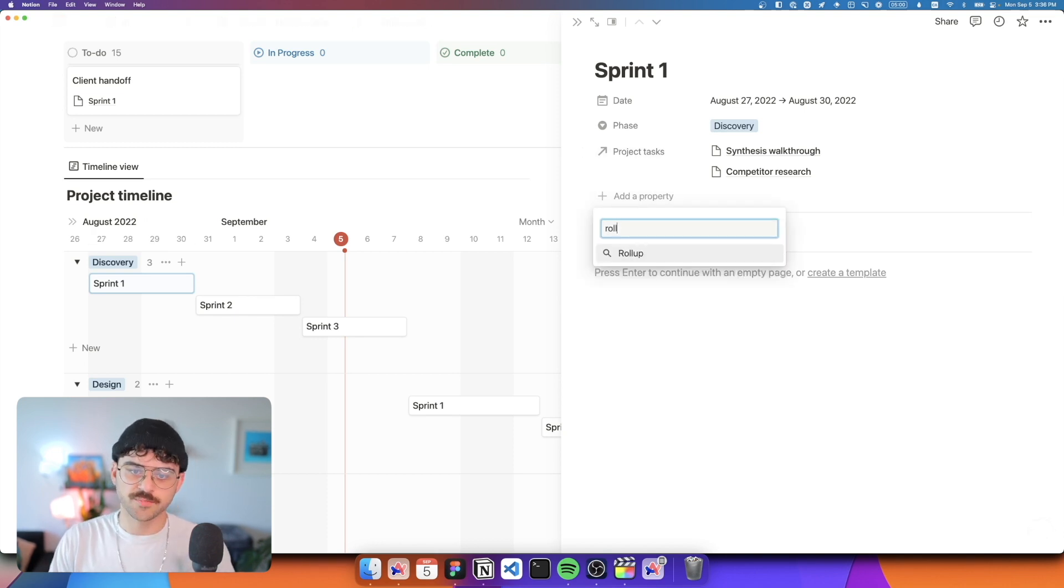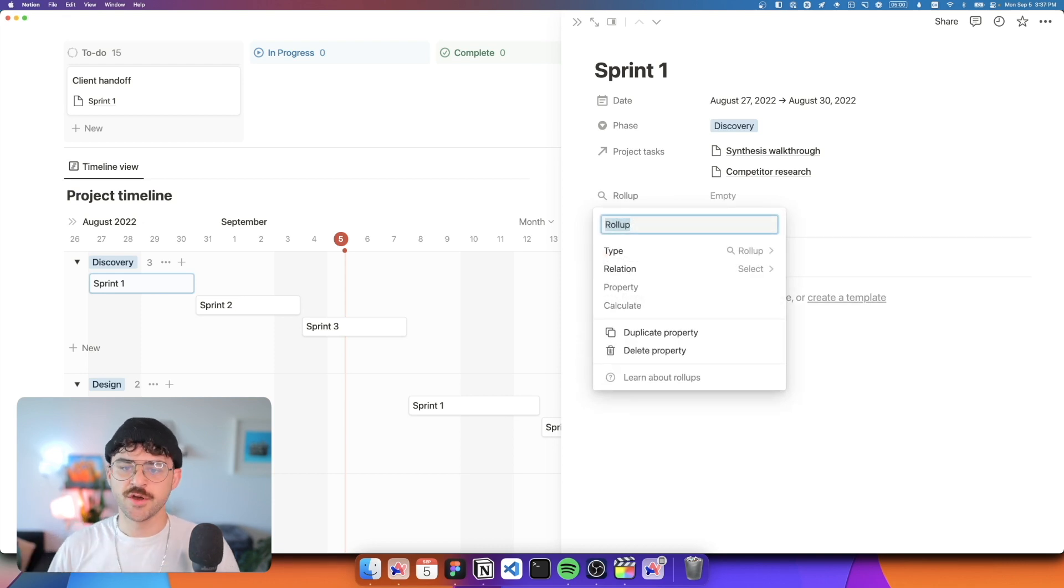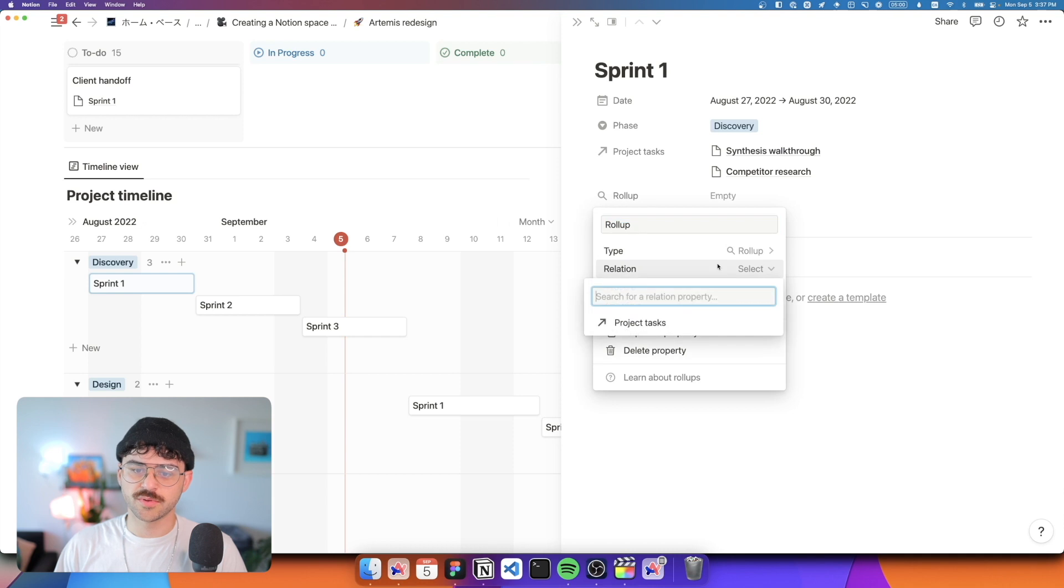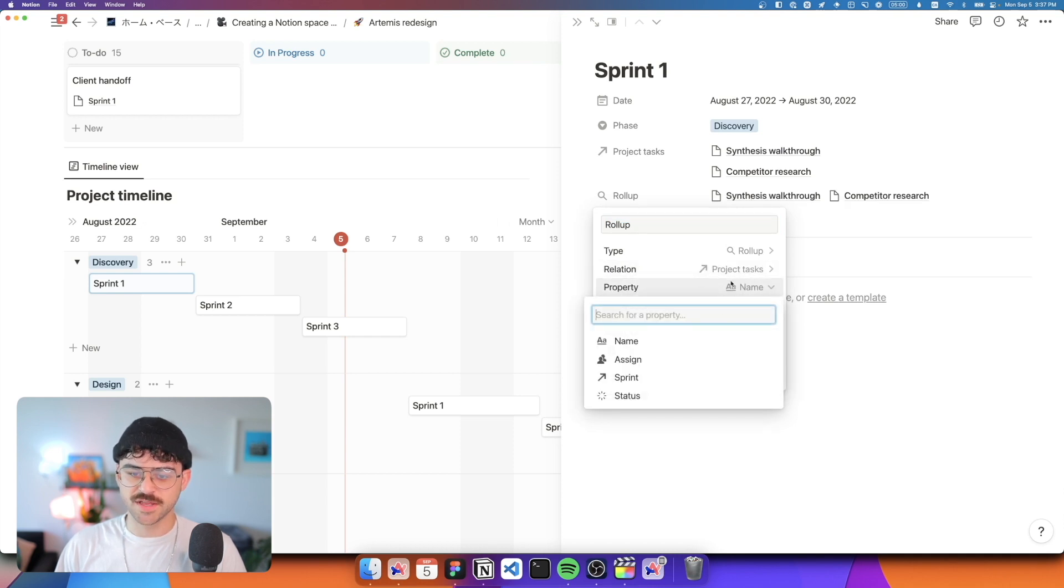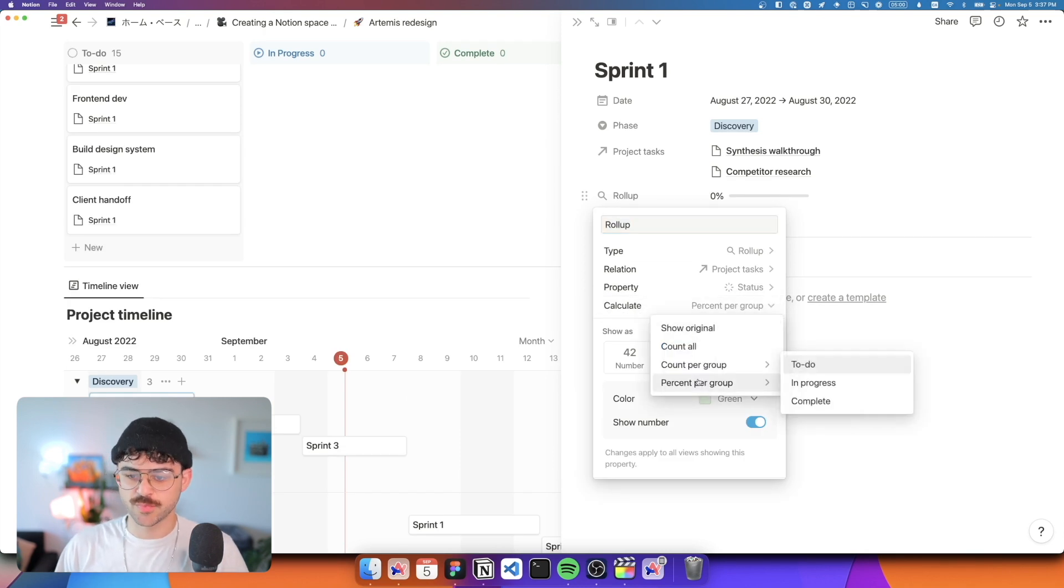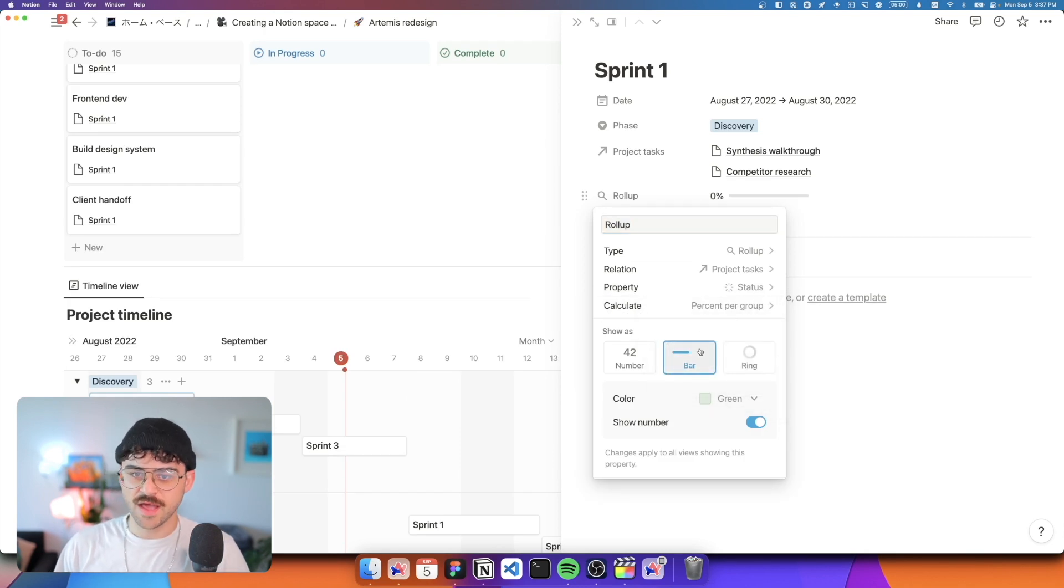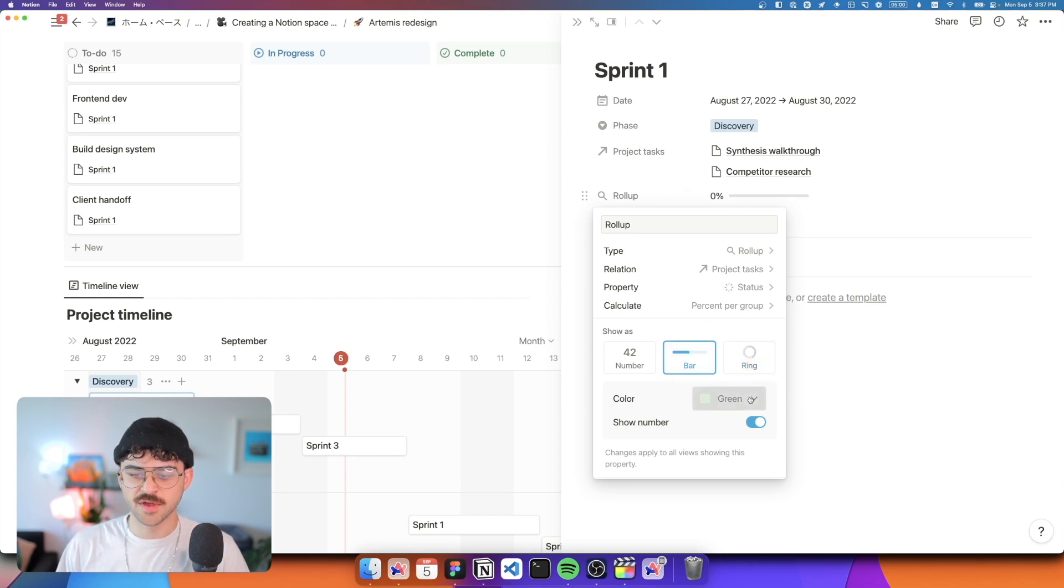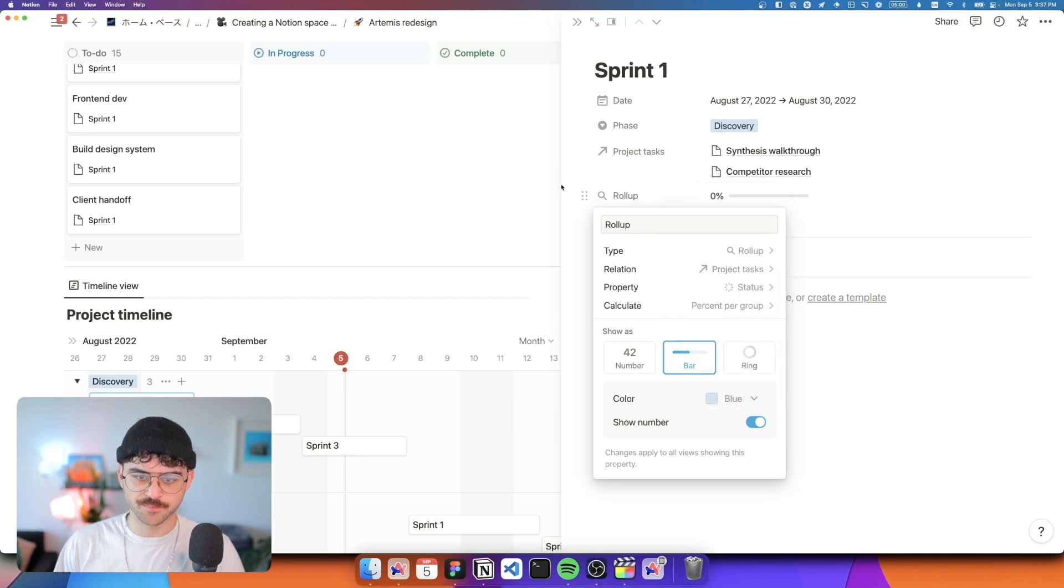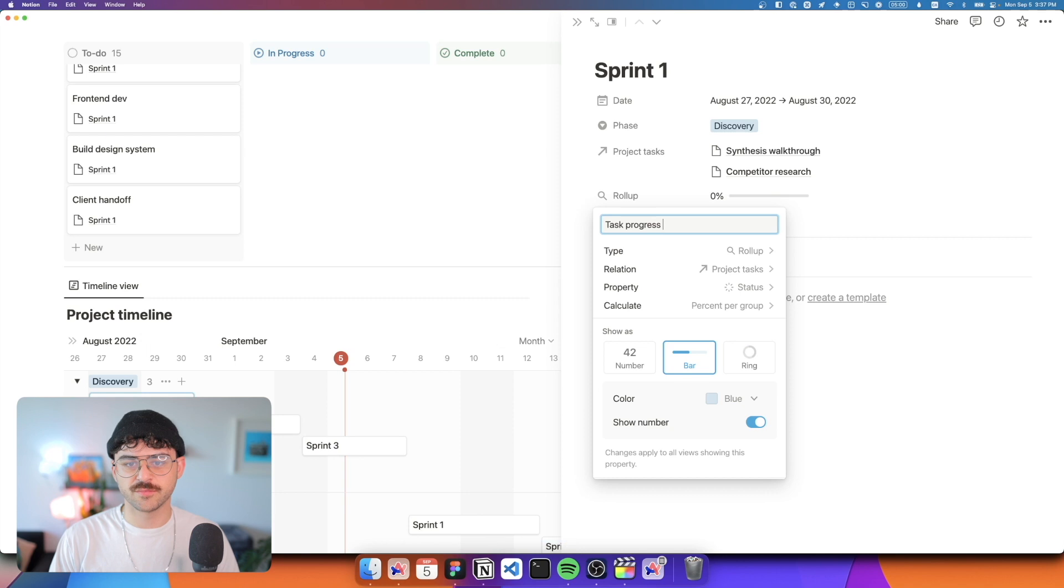And the way that we're going to do that is we're going to use this project task relations to create a rollup. So rollups allow us to grab information out of our relations. So in this case, we're going to roll up our relation from project tasks. And what we want is the status and want to show the percent per group of complete tasks. And then from there, we can select either a ring or a bar. I personally like the bar, but obviously it's up to personal preference and we're going with this blue theme. So I'm going to make it blue. And last thing, I'm just going to call this task progress bar.